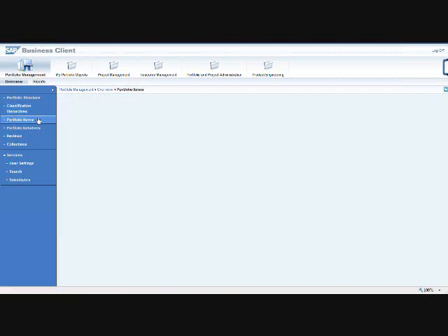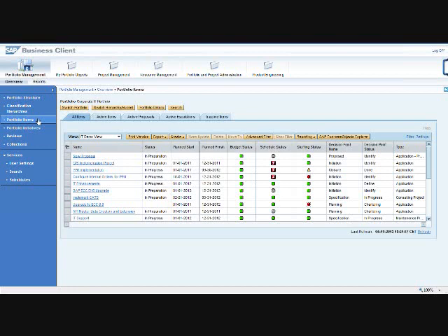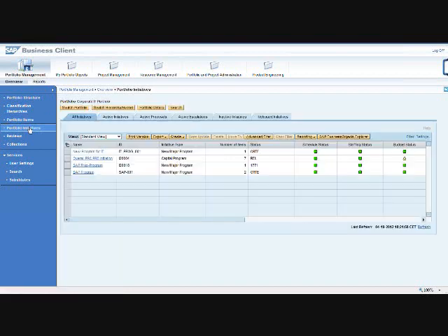We've got our portfolio items, which are, again, projects in SAP. An item is a project, although you can put placeholders in here for your prioritization, and that's why they're called an item, because until they're started or approved, they're not really a project if they're not active. Portfolio initiatives, that's more of a top-down planning, or what I'd like to call a master plan. It is a program, so you can budget. Like an example for a Windows 7 deployment, you could have a proof of concept with a small group, and a second sub-project for the actual larger global rollout of Windows 7. So that is a top-down program.